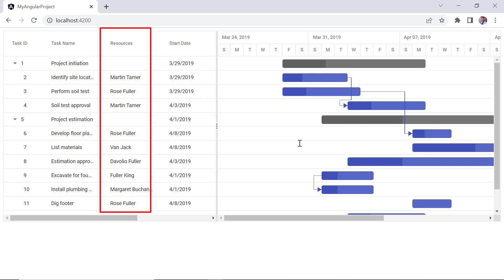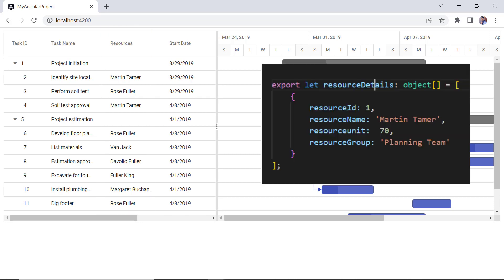Next, I'll show you how to allocate resources to the Gantt chart. Resources are JSON objects that contain an ID, name, unit, and a group. The ID field is used to assign the resource to the task. The name field is used to map the resource names. The unit field indicates the amount of work a resource needs to do in a day. And the group field is used to group the tasks assigned to that specific resource into a category.